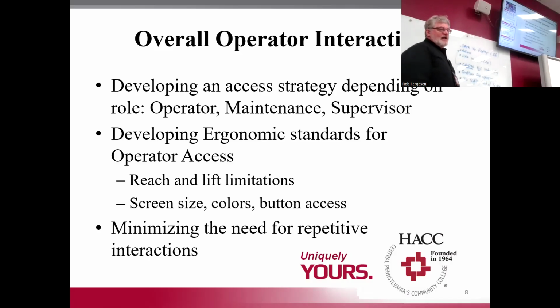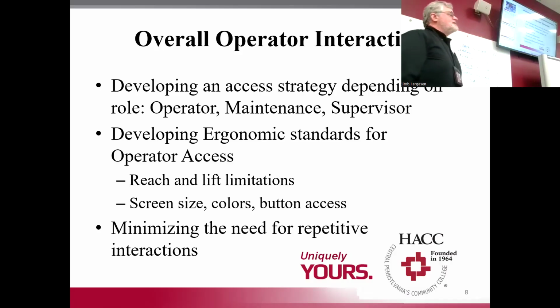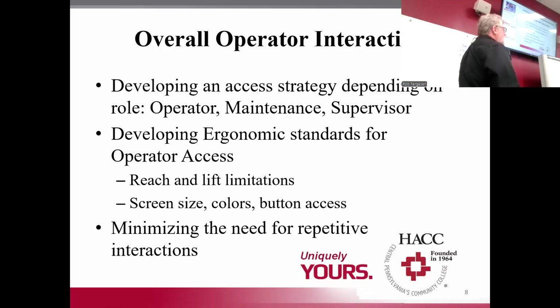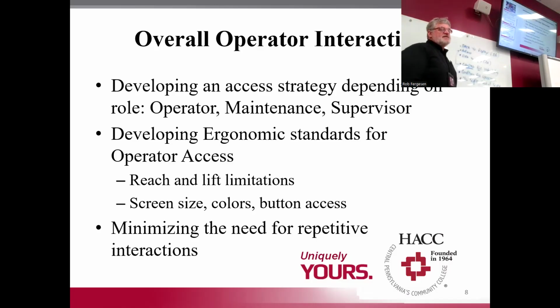So you've got to develop a strategy of working with your operators. And that strategy is often making sure that you clearly set up roles and set up education around this process. What I like to do is usually define clear roles, like one person's an operator, one person's a maintenance supervisor, or overall plant supervisor. Each one of them is going to get a specific role. Each one of them is going to give you requirements and help you review.